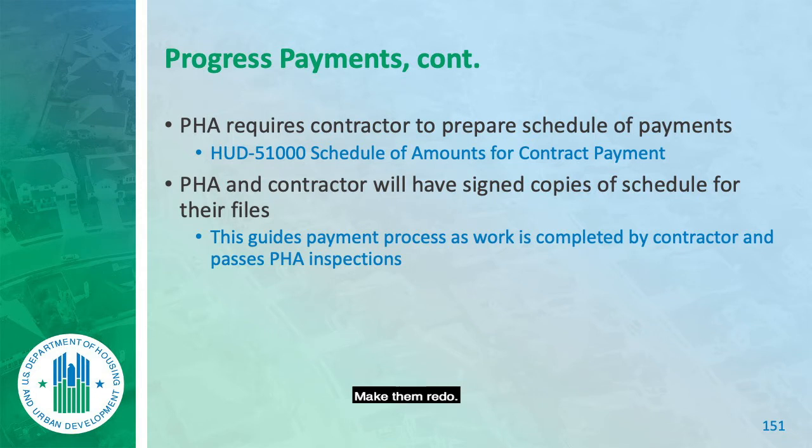Make them redo, no handwritten, make them redo their payment requests to make sure that they're exactly properly written the way they're supposed to be. They're required to do the documentation and to do it properly, as we talked about. We would always have our retained architects sign off on all pay requests, that they also agreed.